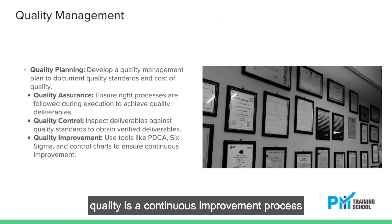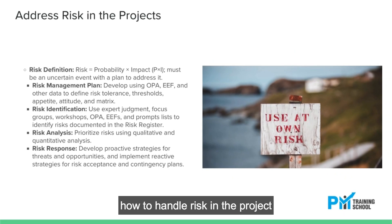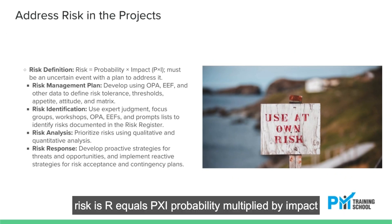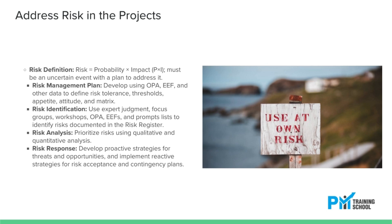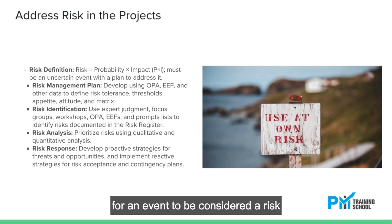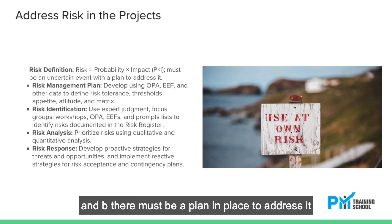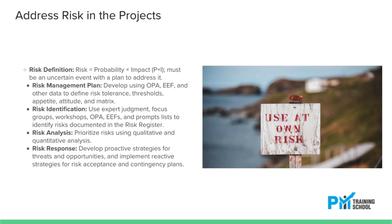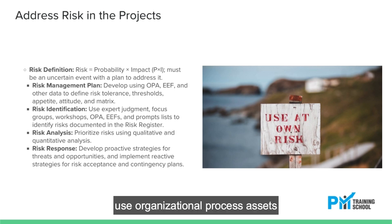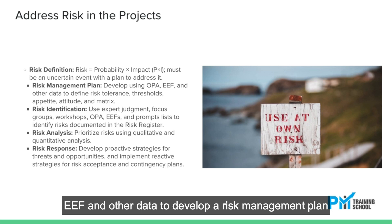Quality is a continuous improvement process. How to handle risk in the project: Risk equals P times I — probability multiplied by impact. For an event to be considered a risk, it must meet two criteria: (a) it has not yet occurred, and (b) there must be a plan in place to address it. Use Organizational Process Assets and other data to develop a risk management plan.